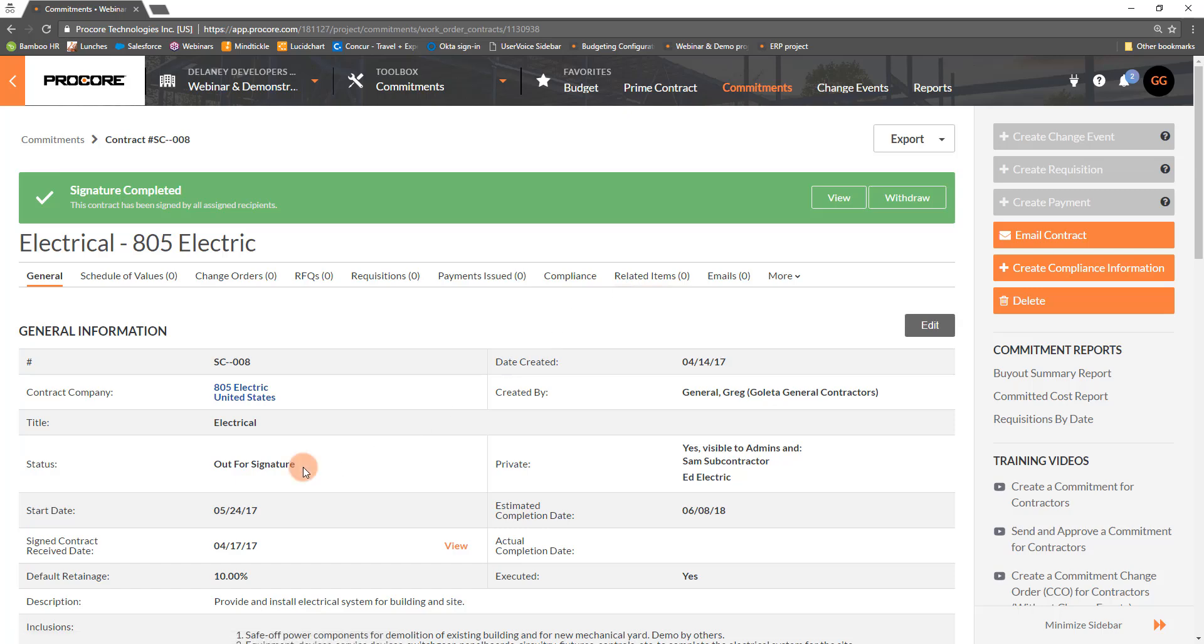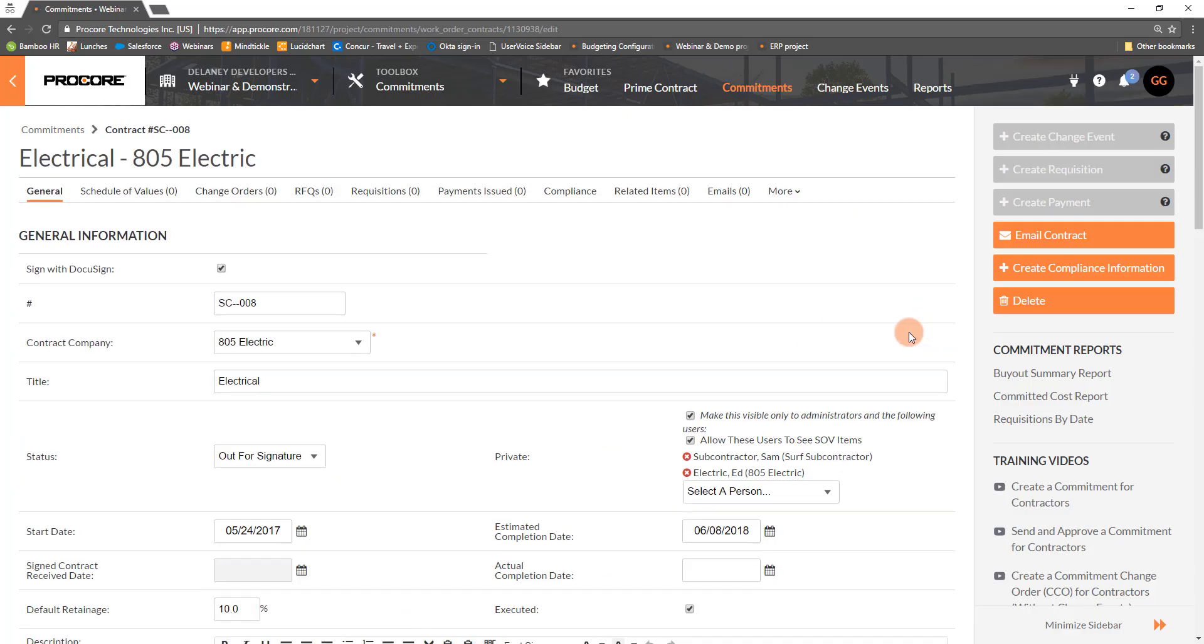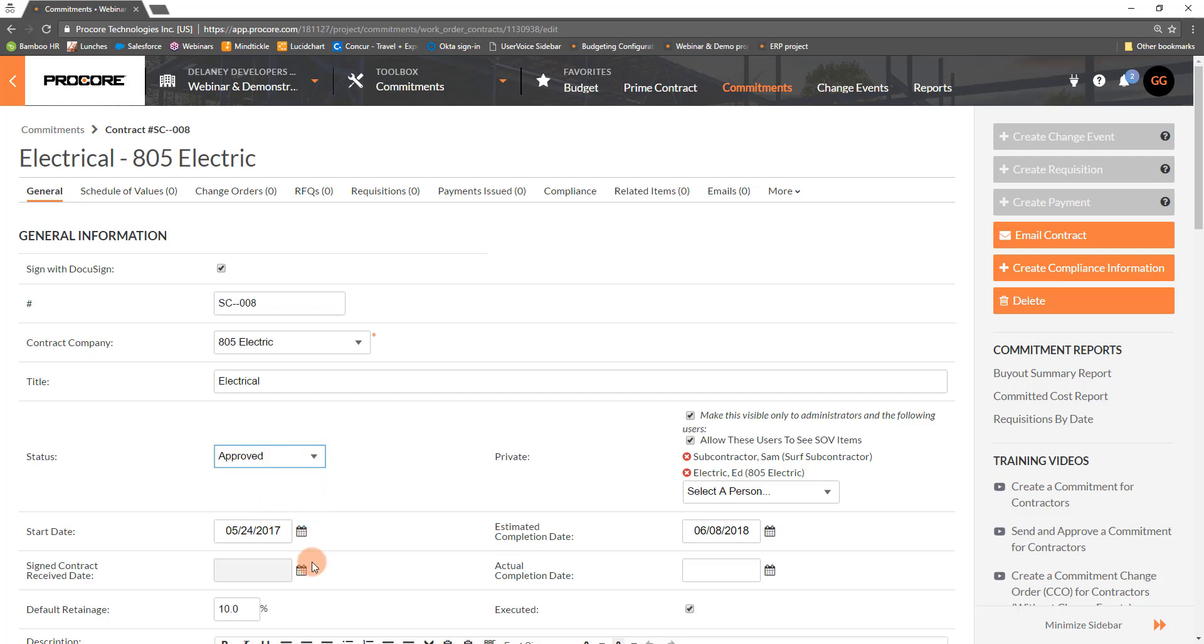The final step is to manually update the status of the commitment to reflect it is complete. The signed contract receive date is grayed out since this is populated by DocuSign when the commitment is not in edit mode.